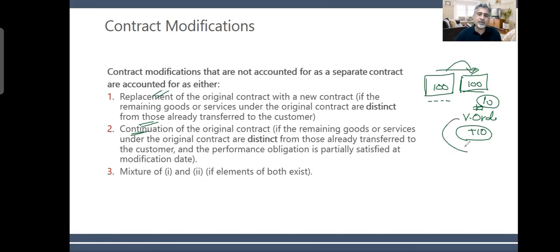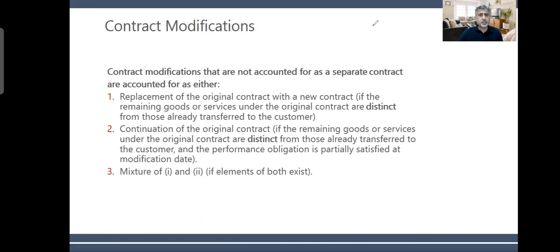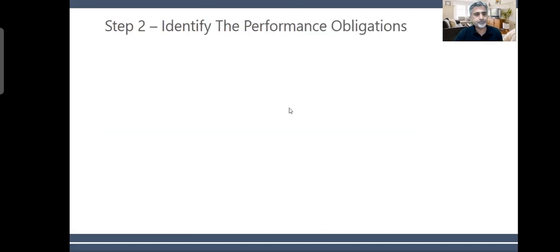Then we add one variation order, and we know that we have to somehow compensate you $10. We will compensate you later on. And this works through variation orders. We manage it: the initial contract is in place, and later on we keep on adding variation orders. It will save you from hassle. So this is the practical side of these large-scale complex contracts.